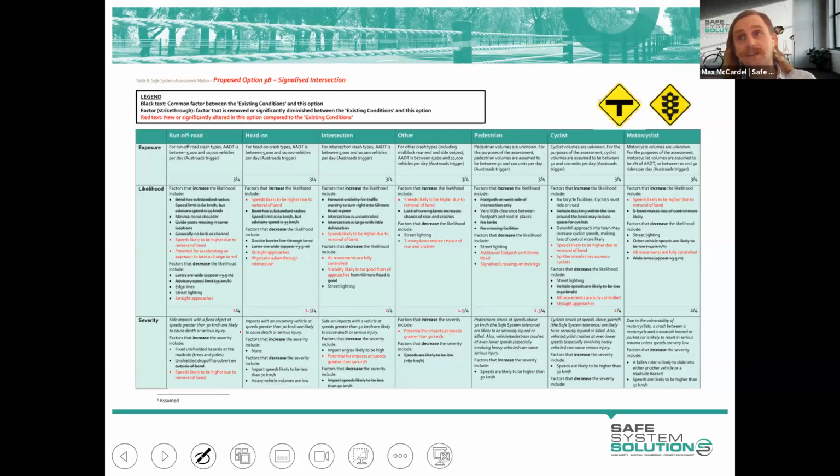Yes, it is. MCA, multi-criteria assessments. So part of a business case, a safe system assessment could be used to add value and demonstrate how safety or alignment with safe system principles is being managed. But you would have other things that you need to look at. What's the economic benefit of this project? What's the environmental impact of this project? All these types of different factors, and the SSA can be used as just one of those inputs.